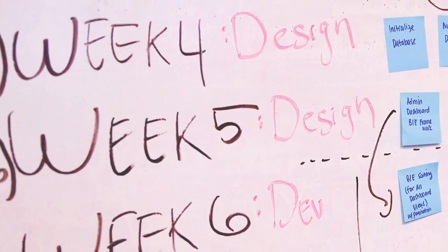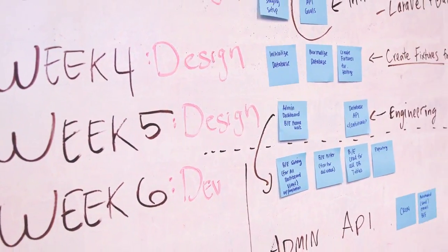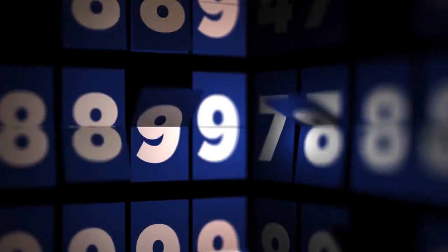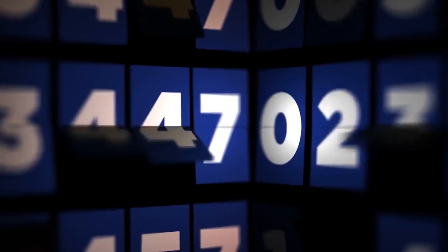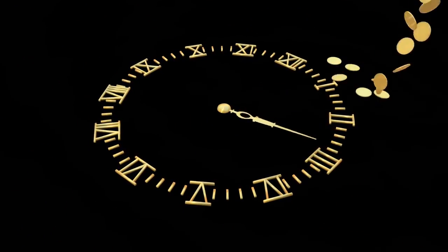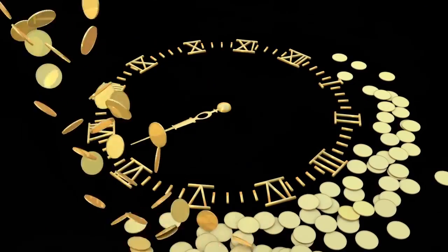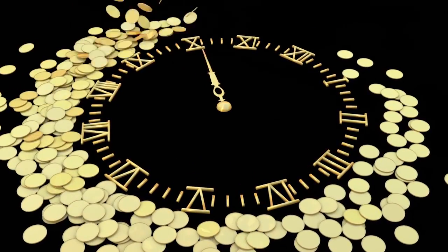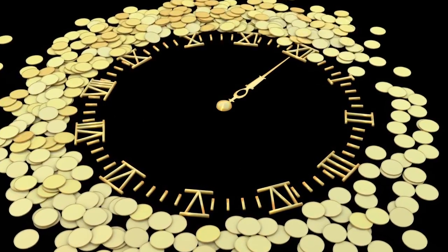Each task within a project should have an anticipated time frame associated to it. However, because some of the risks mentioned above can delay a project, it's important to have extra time built into a project's timeline. Float. Another way to look at float is how many delays, minutes, hours, days, even months, your project can have without interfering with the projected completion date.